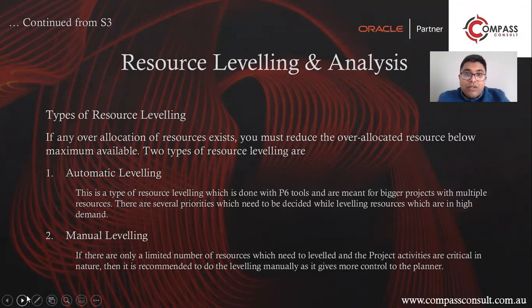And you can also increase the resources by 25 to 30% wherever there is a peak. That's also a feature for leveling the resources through auto level. The other thing that I appreciate the most is manual leveling. Yes, it takes time, but it gives you the correct logic, because each and every activity has a different set of logic, and you need to increase the resources or increase the duration based upon the logic, rather than just using the float and doing it.